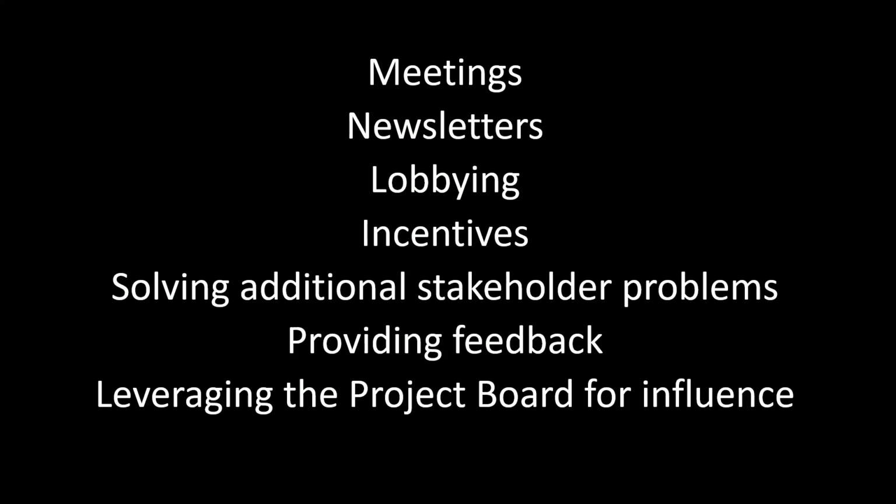So the communication plan itself will tell us who we are going to communicate with, which stakeholders, which individuals. So who's the contact person within an external organisation, for example? What is it we're actually going to communicate to them? What information is useful for them? What data do we need to provide? What we do need to take into account, of course, is things like GDPR and data protection, and make sure we're not sharing information and data that is either confidential or commercially sensitive.